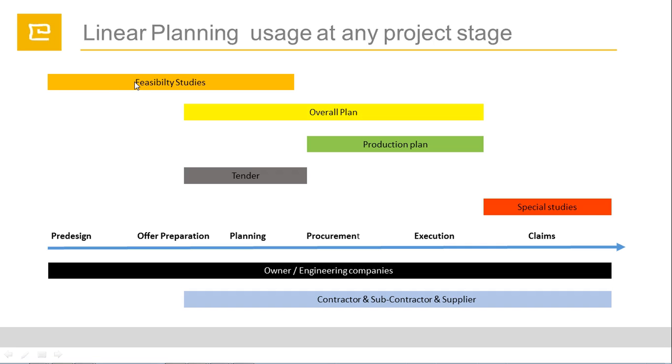What does it mean? As you know, infrastructure projects generally have very wide scopes, and these are generally design and build projects. That's why when you make the bid, you don't have too many details, because designs are not completely ready. And it is also an issue that if you don't have many details, you can't make very advanced level 4 planning inside of the classical project management system, because there will be too many activities,